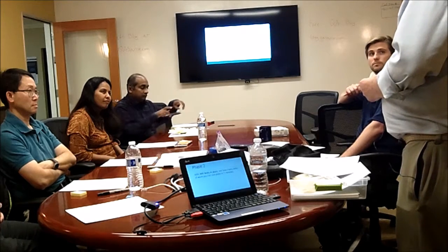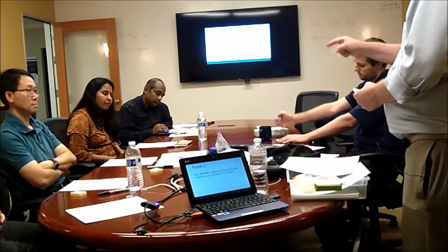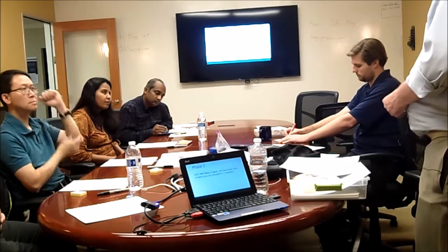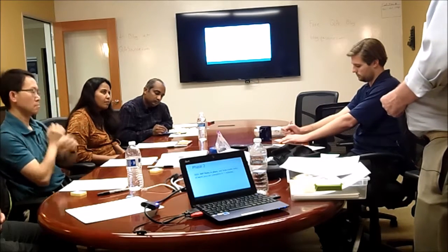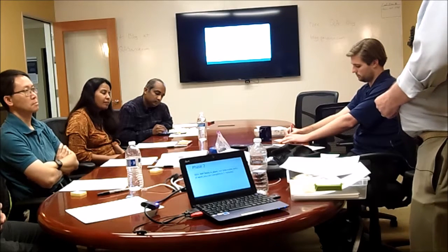The basic difference between a Kanban board and a task board is that the Kanban board has WIP limits on it. In fact, you could put a WIP limit anywhere on this board, and that would technically be a Kanban board. And you get the term Kanban, you know what that's about? You know the origin of that? Read about it. Yeah, signal card, right?